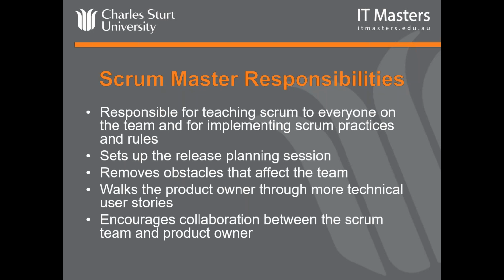Is there a hierarchy? Yes, it needs to be prioritised, and that's the responsibility of the product owner. So normally what we say is the story has to have business value. What's the biggest business value? You could use high, medium and low, but that doesn't work very well because then you've got 3 highs, and which is the highest of the high. So sometimes they just use some numerical value. It doesn't equate to anything apart from an 800 is more important to build and put into production before a 700.